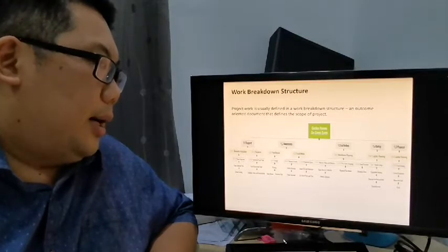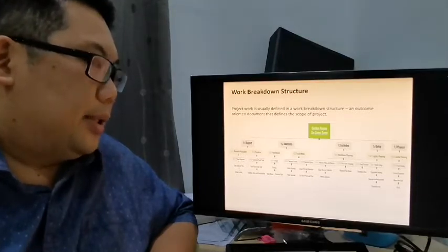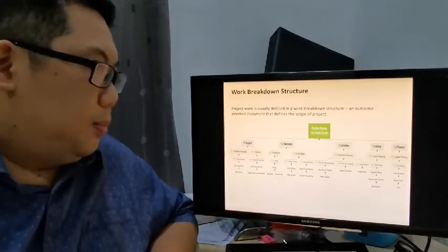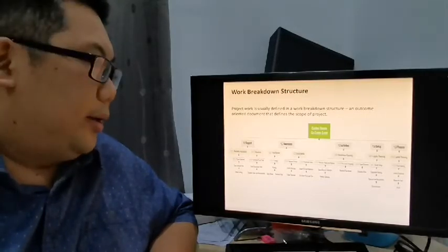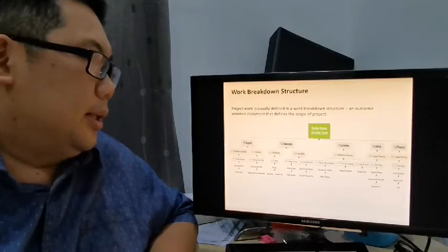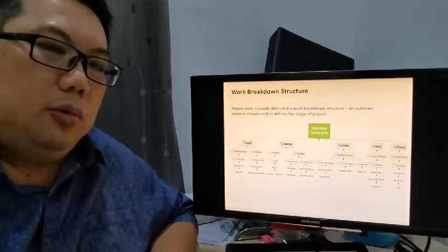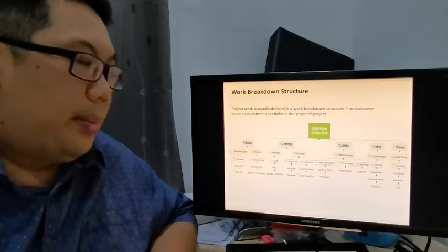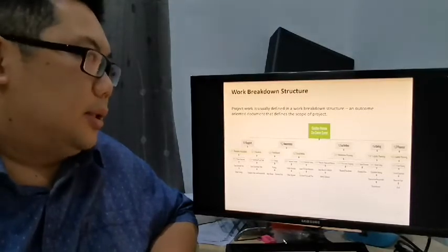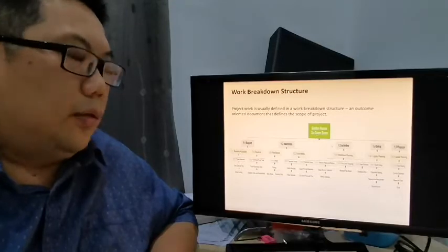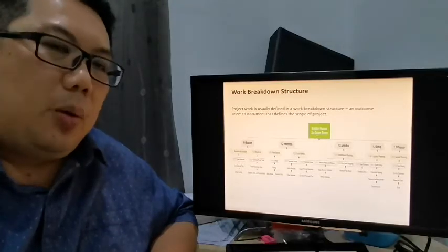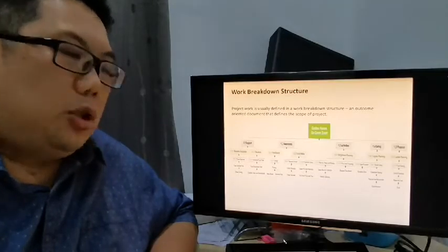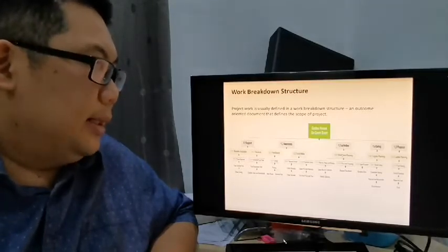The second important project deliverable that we think of is creating awareness among the residents. So we identified work breakdown structures like creating a fundraising banner, publishing articles, sharing on social media, on our Telegram group or Facebook group, and setting up reminders for when the event closes. Third, we must identify the list of program activities to support this event, so we must do proper work stream planning.